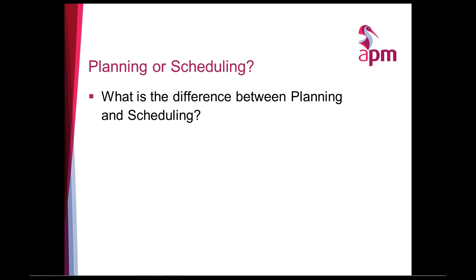What planning is, it's almost a deep thought process of deciding what needs to be done, when it needs to be done, what activities we need to do, what resources are required, and how we're actually going to accomplish the project. So planning is kind of an art rather than a science. It's based on experience. It involves innovation, teams working together, locking themselves in a room for a couple of days, using sticky notes and post-its to come up with the work and the work breakdown structure. And that's one of the tools they use in planning.